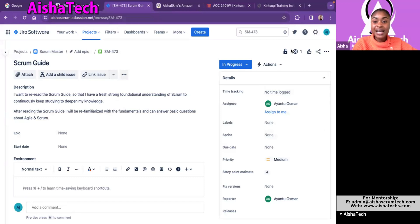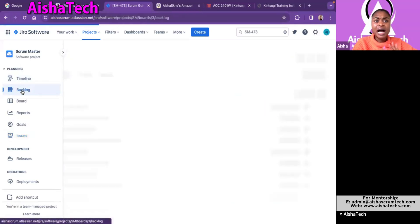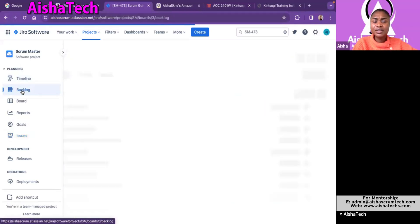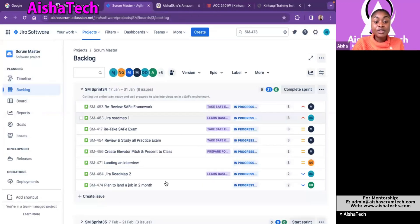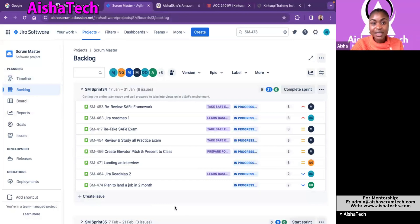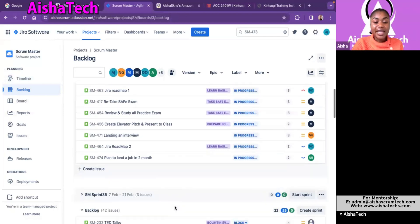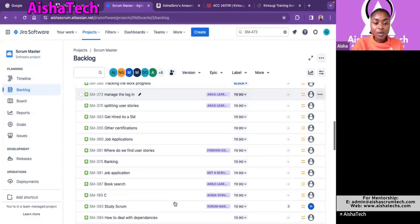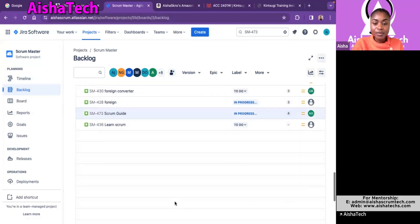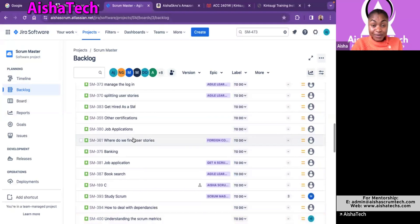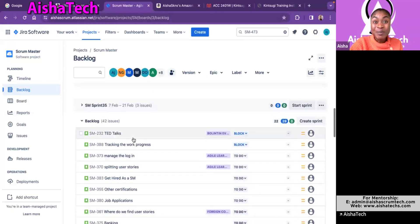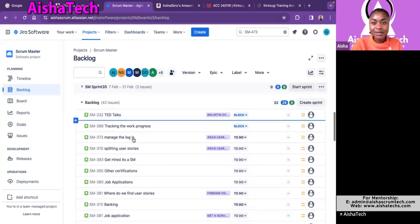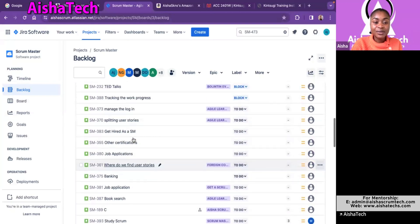And when you X it out, it's going to move this story to outside because now the sprint says none. Now that the sprint says none, that means this story now it's out of the sprint. So then we're going to go back and check. And don't forget to refresh your board in case you are like, oh my God. I've done it. And the story is still there. Always just refresh. Read the arrow and refresh. And ta-da! You see? The story also left. The story came out of the active sprint. From me opening up the sprint and going in and delete the sprint space. I just delete the sprint's number. It actually take it out.